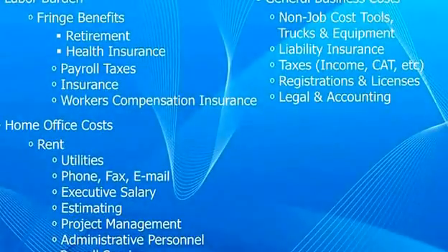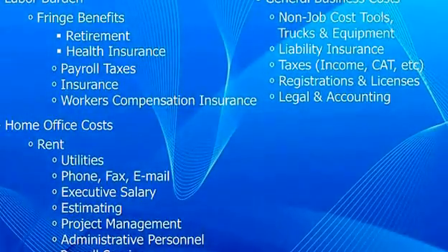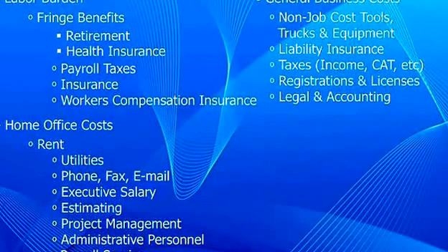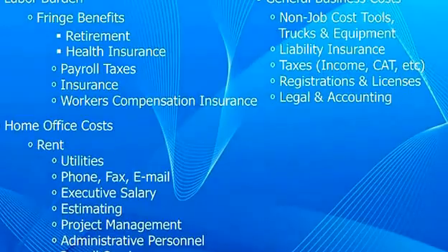listed on the next slide. There's everything I could think of with your home office costs, your salaries. Your labor burden is a huge factor for a self-performing contractor that we haven't really talked about yet. I printed out a sample labor rate sheet that we use for local 310 laborers. This is their updated rate. Their taxable hourly rate in their check is $24.53.